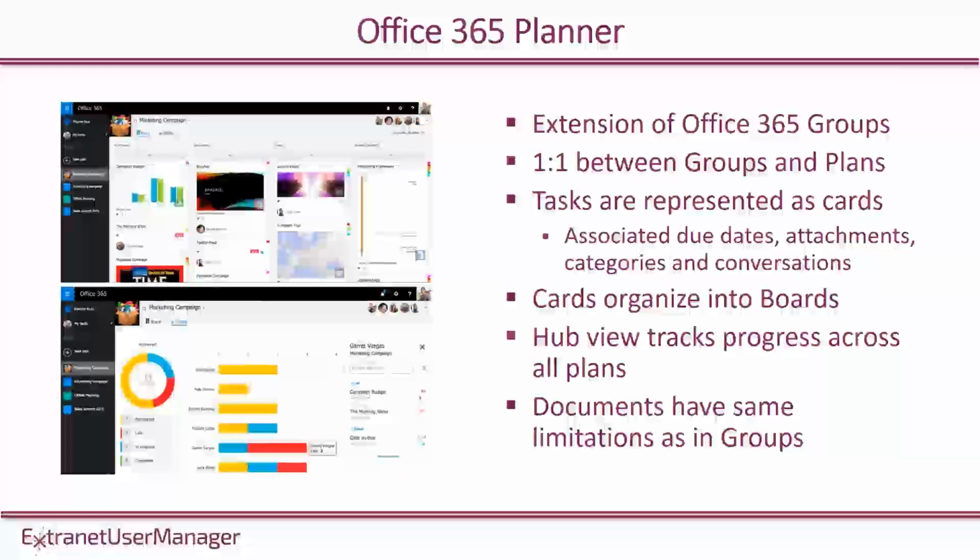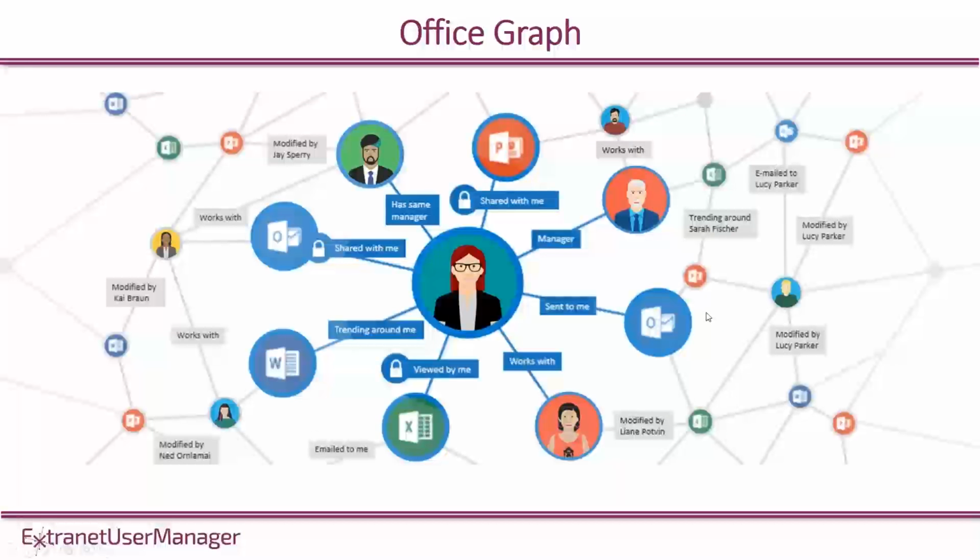They can track how far through completion they are, and then they roll up into what's called a board that basically shows you, as you see on the lower left corner here, what's the status on all your different tasks and how far through your project you basically are. Then you can roll another level above that as well. It's what's called a hub view that sits above your individual projects, and you can actually see at a higher level organizationally how things are tracking.